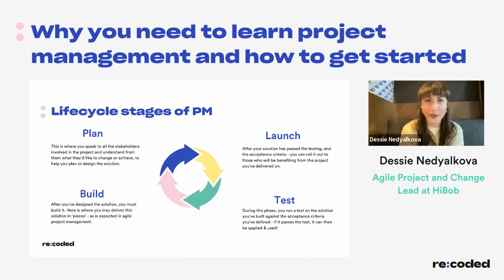Then comes the build part. This is when you actually get your hands a little bit dirty. After you've designed the solution, you must build it, or the teams that you've brought on board to build it must get on with it. It might be a process, a product, or something else. So it might be any of these things. But here is where you may deliver this solution in pieces, as we just saw earlier in Agile project management. This phase also includes defining what success means. So how do you know what you've built is suitable? How do you know that it's going to meet the needs that you captured from all your different stakeholders in the very first planning phase? We call this in project management an acceptance criteria.